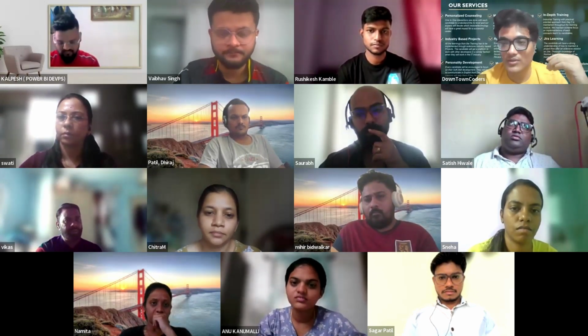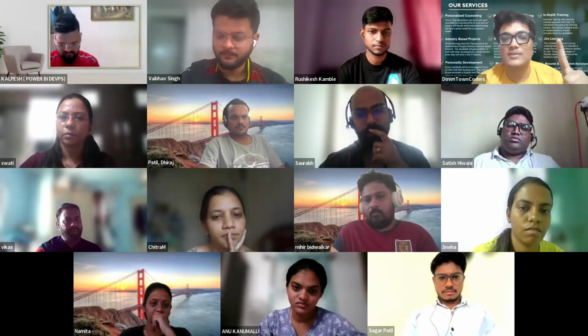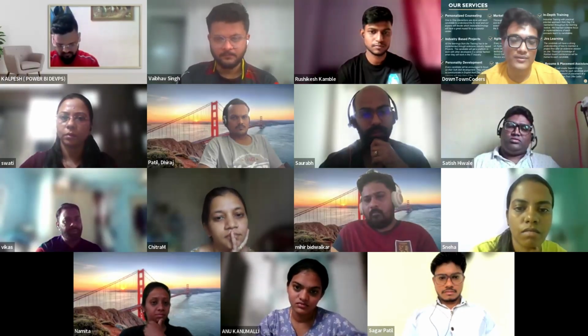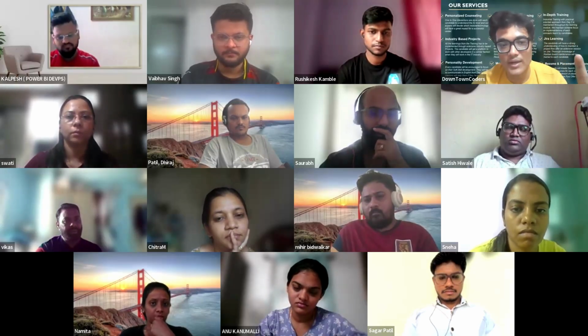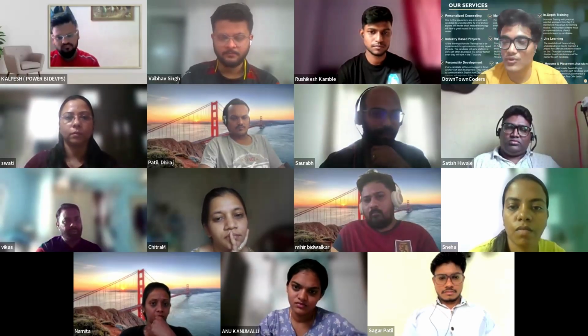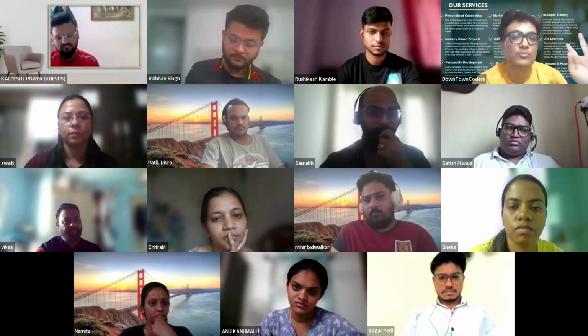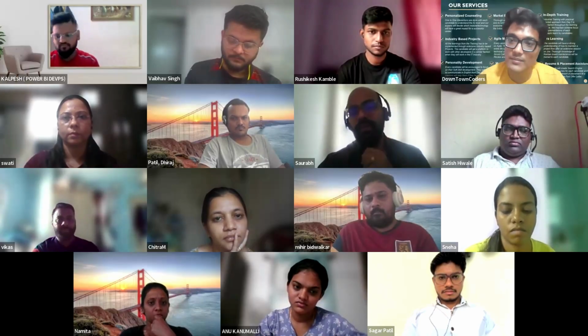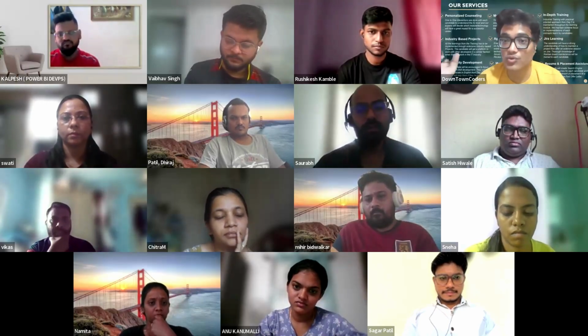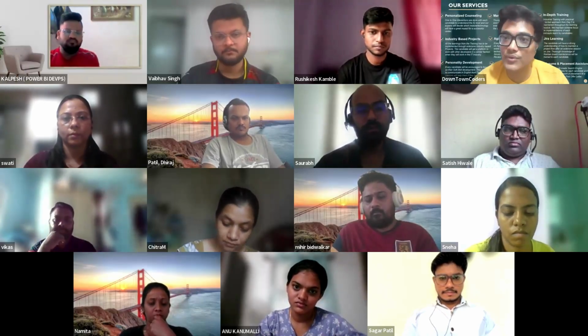Very, very common sense question, I told you, right? One story point, let's consider, is 8 hours of work. We work for 22 days. So one story point is equivalent to 1 day. So the maximum number of story points that can be handled is 22, right? 22 days, 22 story points. And that is the maximum number of story points that should be handled by any developer.